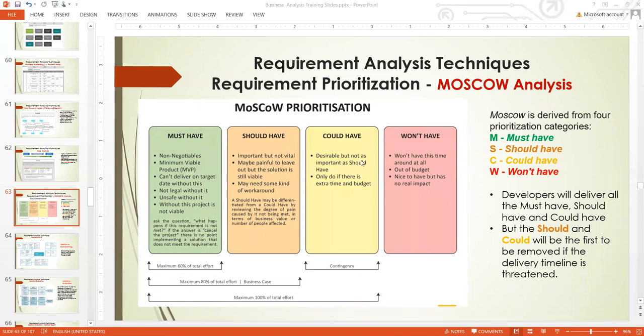Could have: desirable, but not as important as should have. Only do if there is extra time and budget. So we can only have blog if we have extra time and budget. And this particular one is a boundary. Won't have time. Won't have this time around at all. Not on budget. Nice to have, but has no real impact. So we should not bother our time trying to go into this area at all, in order not to waste our time and resources. So that's how we can prioritize